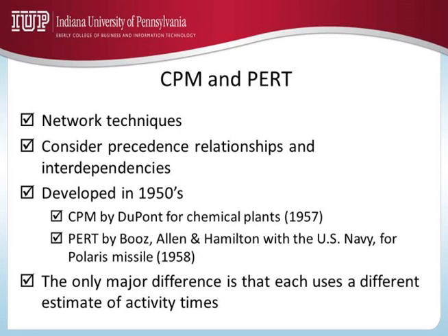What is the difference between CPM and PERT? Essentially, they are the same, except for one key difference. CPM uses what we call deterministic time estimates for tasks. So if one of my tasks is excavation and foundation for the building, in CPM I would say that particular activity of excavation and foundation will take 20 days.